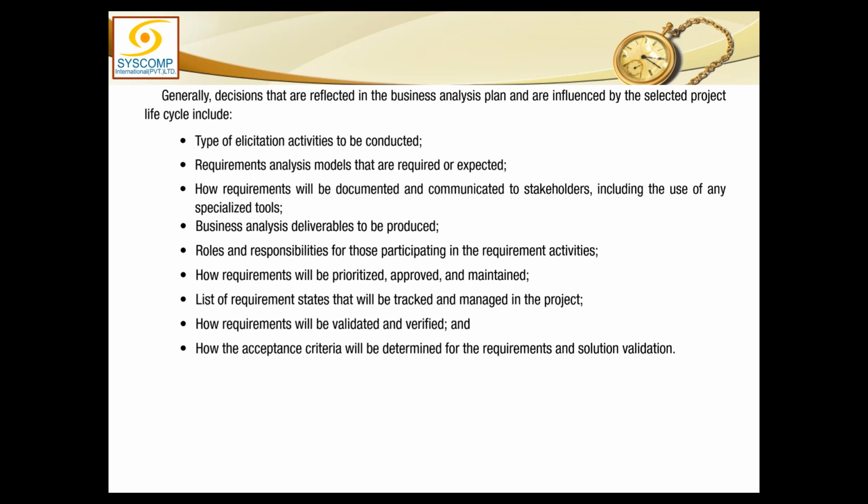Okay, very good. But the name of verify scope has changed, right? If you read your fifth edition you will find it is now validate scope. So the process has also changed. Verification and validation: when a deliverable comes out of execution, it goes directly to quality control. The deliverable is checked for quality and gets verified. After having been verified, the deliverable goes to the validate scope process, and there the user acceptance is carried out, and ultimately the validated or accepted deliverable comes out of it. So this is slightly changed from the fifth edition.